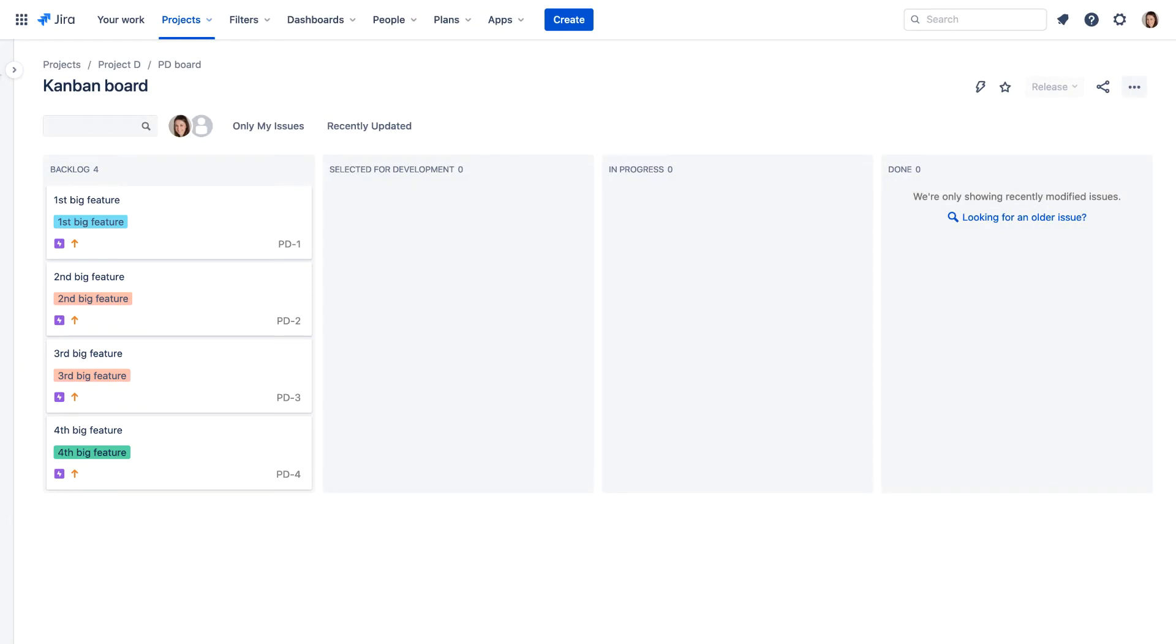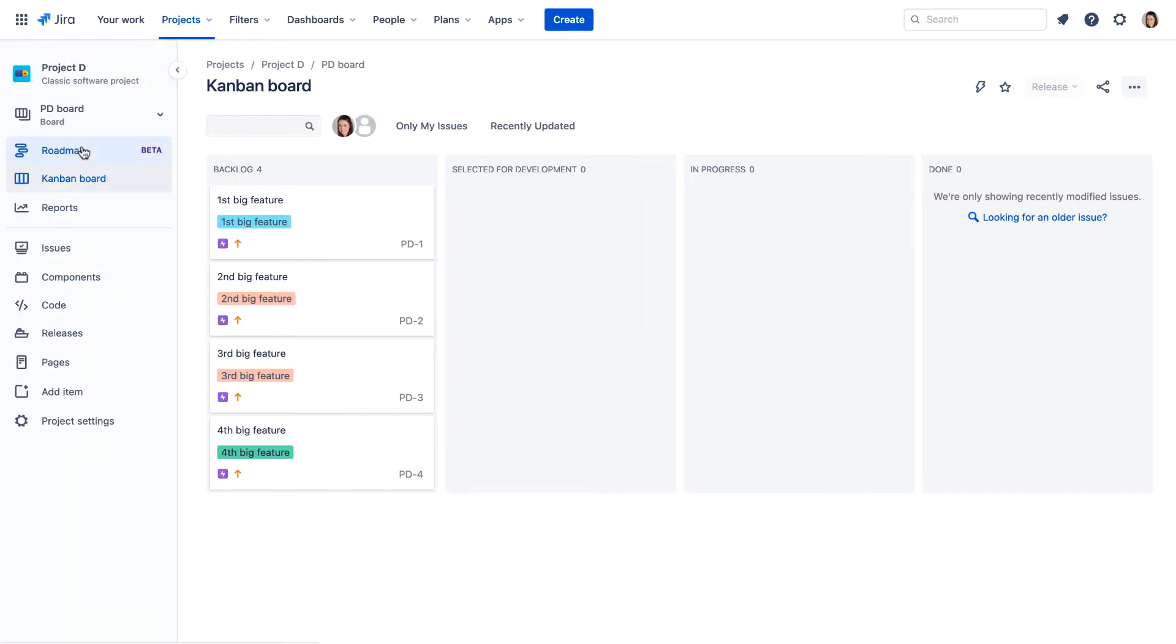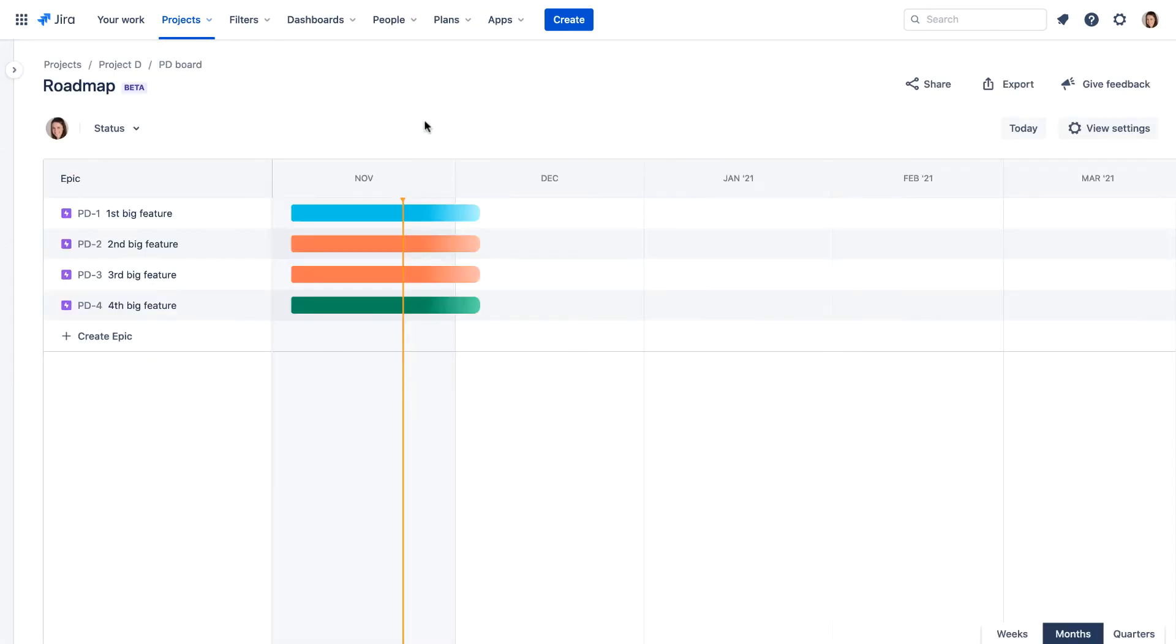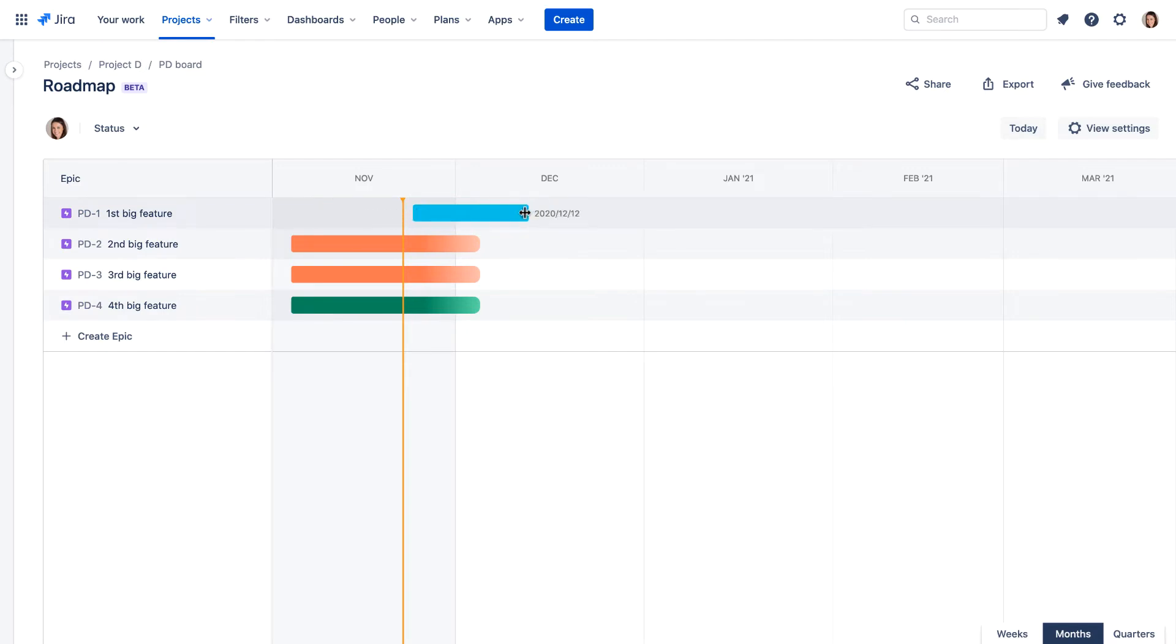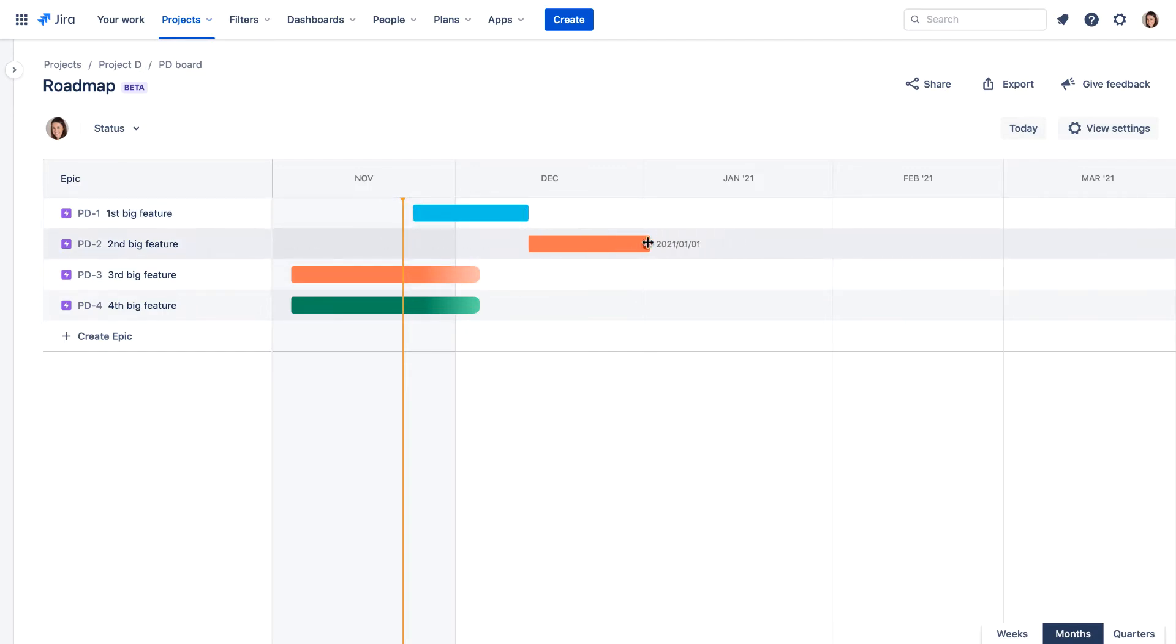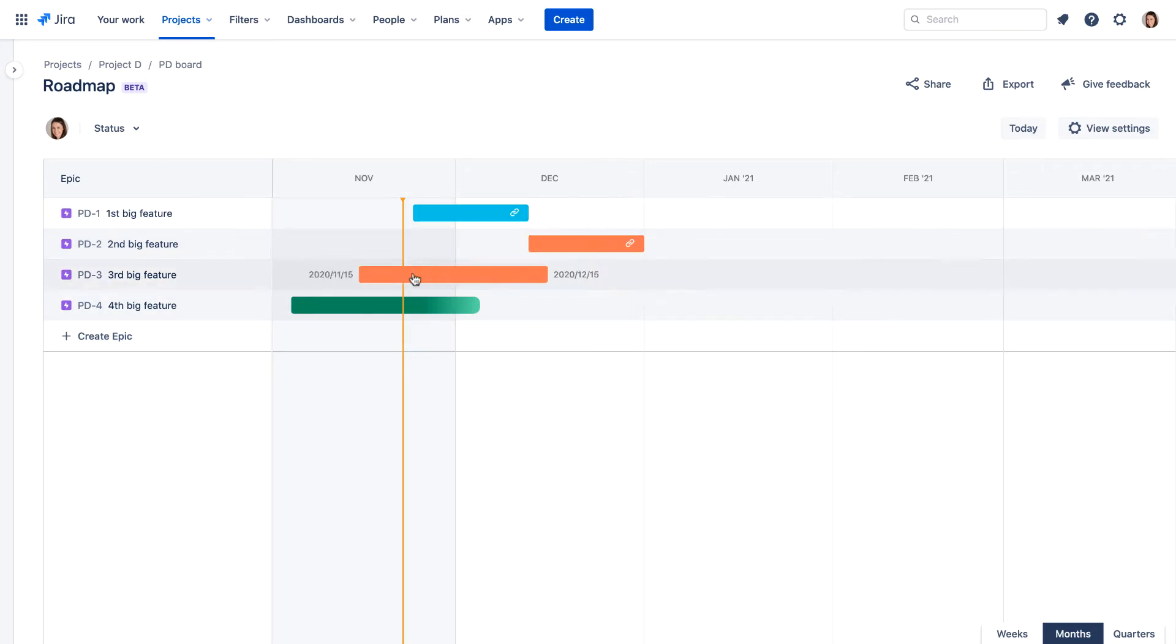Returning to the roadmap, we'll adjust the bars to map out a projected schedule for the completion of the epics. The start and end points of each bar represent the start and completion dates for the epic.